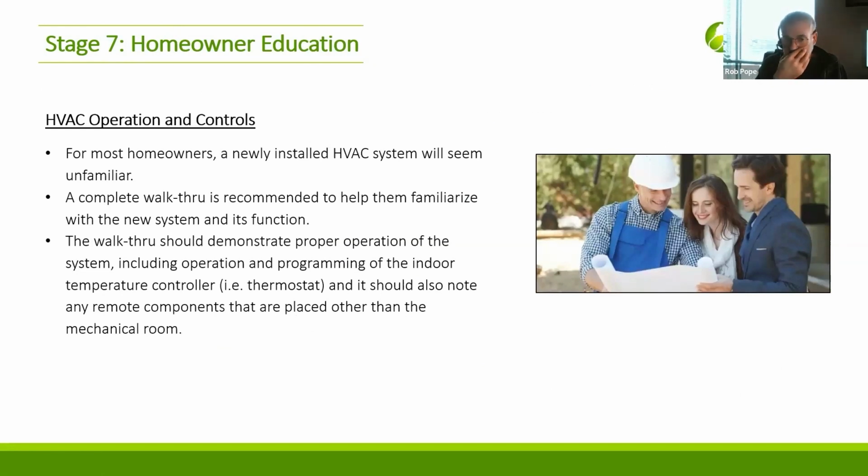And then finally, once you've done all the verification and you know it works, now you can do the handover to the homeowner. And there's a lot more to it than is apparent, because these systems are getting more complicated, right? And so you really do have to educate the homeowner. This is how you program the system, help them out with it.